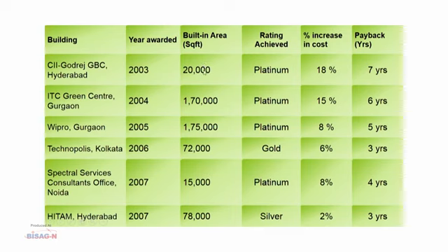and you can see the built up area was 20,000 square meter, and there was an increase in cost of 18% in that, and that cost was recovered in 7 years. That is, by 2010 they would have recovered all the extra expenditure incurred for getting the green rating.